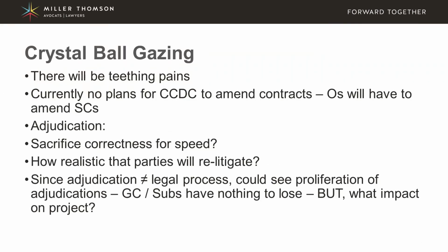All right, so where does this take us? It's quite apparent that there will be a lot of growing pains with respect to these changes because these are significant. Currently, the CCDC has no plans in place to amend the standard form contracts that are typically used for large projects. So in order to address any of these issues that we've discussed, the owners will have to amend their supplementary conditions in order to make sure that they've covered off issues that they want to address.